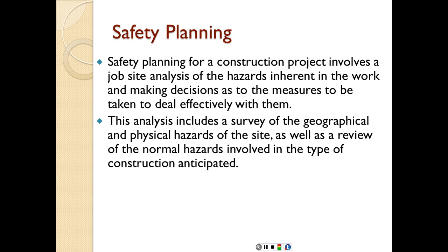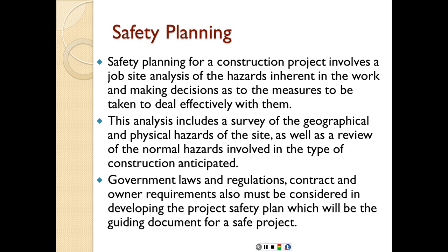This analysis includes a survey of the geographical and physical hazards of the site, so the unique aspects, as well as a review of the normal hazards involved in the type of construction anticipated. Government laws and regulations, contract and owner requirements also must be considered in developing the project safety plan, which will be the guiding document for a safe project.